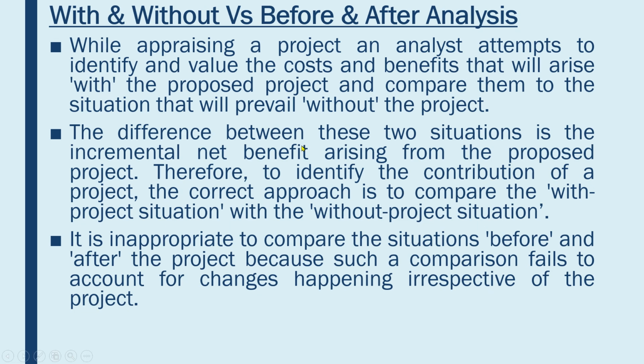So there are two analyses: with and without versus before and after. Before and after, we also call it ex ante or ex post. So here, the first point is, while appraising a project, an analyst attempts to identify and value the costs and benefits that will arise with the proposed project and compare them to the situation that will prevail without the project.